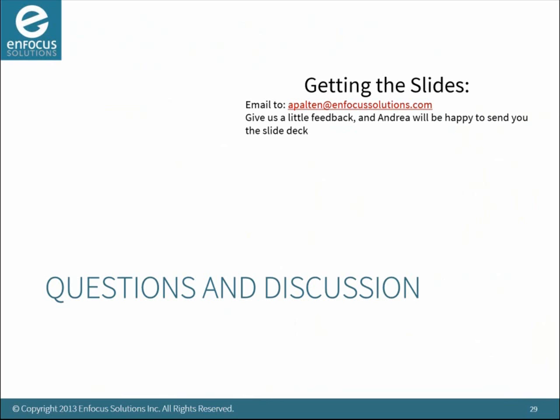So when you get down into the layer of what we call bundles and life cycle events, what you're trying to do is basically say a couple of things. One is, what features are impacting what solution areas at what points in time, so that you can understand what is being hit, like the sequence of projects hitting a particular area at a point in time. You need to have that for the beginnings of configuration management. The next part of it is to say what physically is within certain releases coming at a certain point, which is what we call life cycle events. So that level of detail is something I want you to talk to a guy named John Parker in our organization about. How would you deal with an environment that has a high change rate?